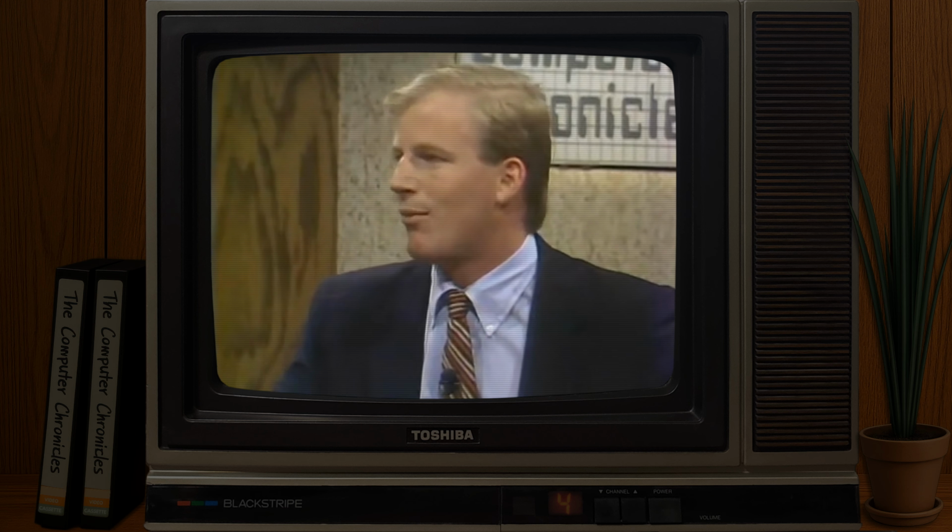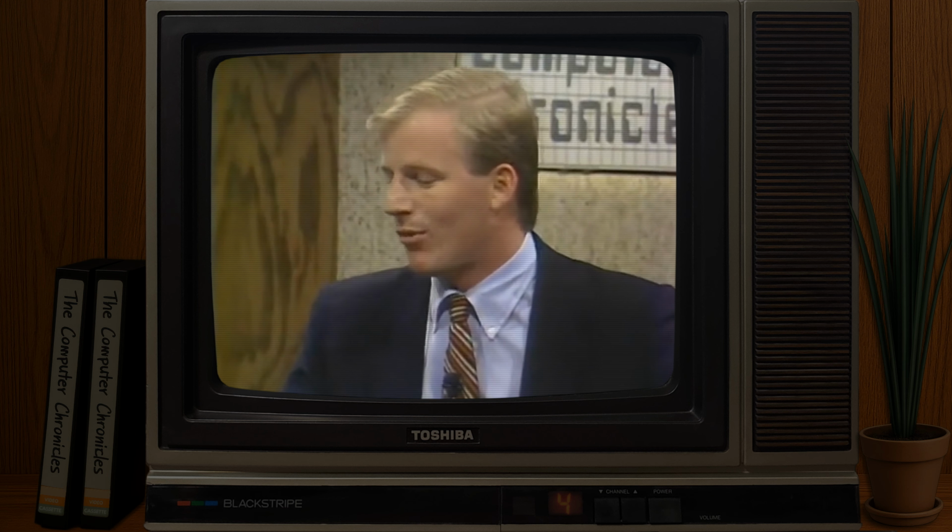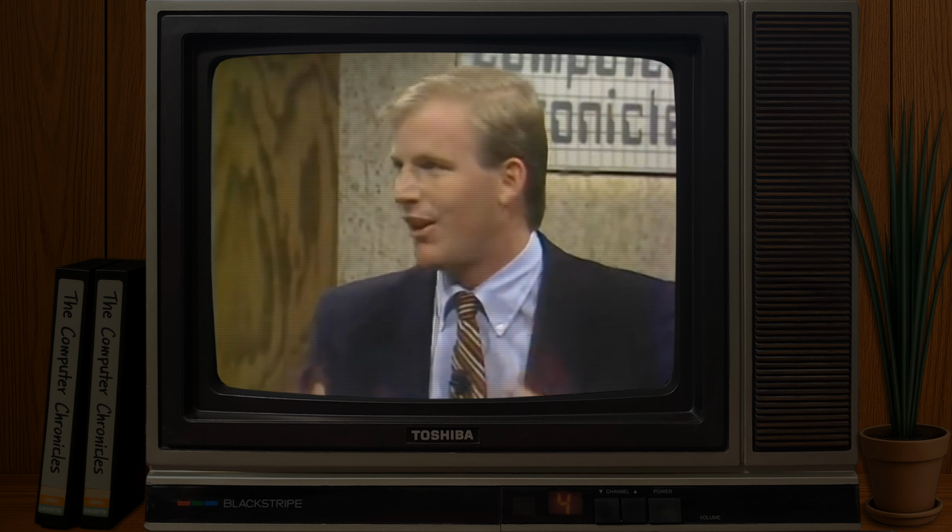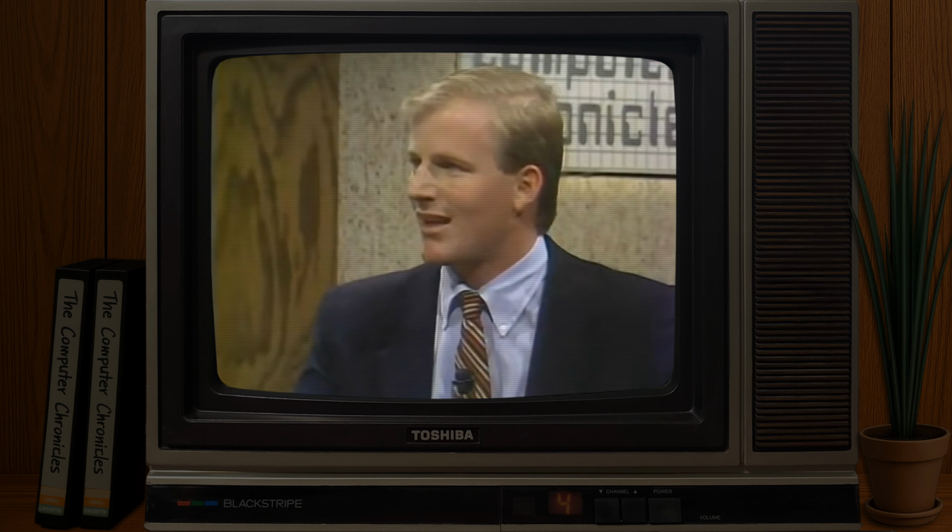That's a very good capability that a lot of products do support right now. We call it sub-networking, where you can take a more detailed schedule, roll it up for the higher levels of management so they're not bogged down in the detail. But many people can be participating, planning things out in great detail.